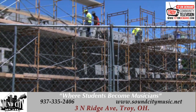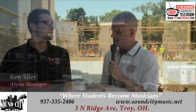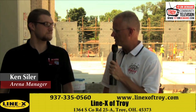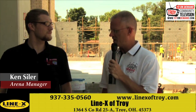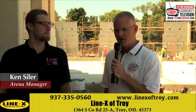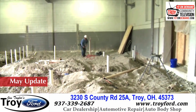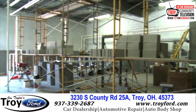We meet every 2 weeks with the contractor and also the architects, and at our last meeting, they indicated that things are still on target and on schedule according to what they had laid out from the onset. We've been fortunate with good weather, with very minimal impact on the work outside due to rain. And the few days that they have been impacted, they can continue to do some work inside that needs to be done. So from that perspective, the weather's been very cooperative to date.